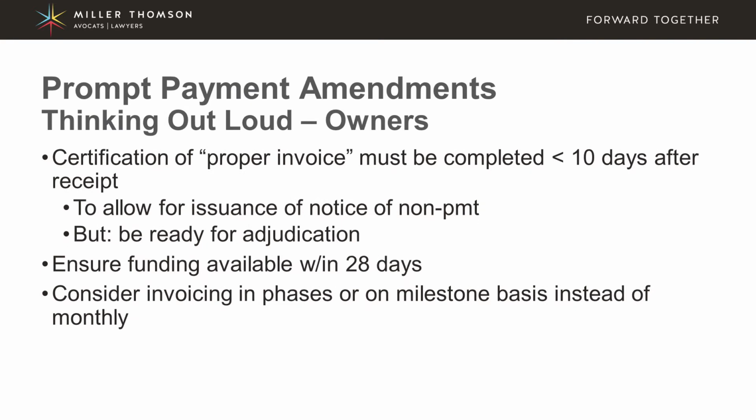So what does this all mean for owners going forward? What this means is that owners must be ready and have their payment certifiers ready to review these proper invoices once they're received, because, and I would say they should be ready to do that within less than 10 days after receipt of the invoice, which is a very short time period.